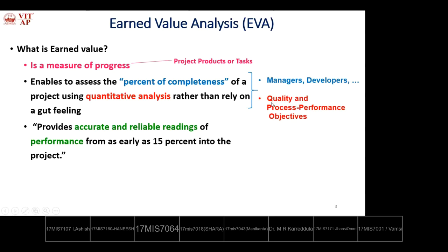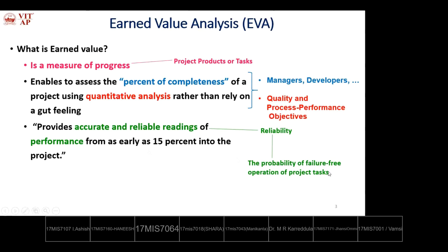Quantitative analysis means determining results in terms of quality and process performance objectives, which are defined in the initial project scope step. During development, we can inspect at any time from day one to day N, ensuring whether the defined quality is being achieved for all the project products. Earned Value Analysis provides accurate and reliable readings of performance from as early as 15 percent into the project.